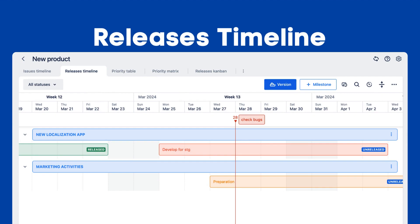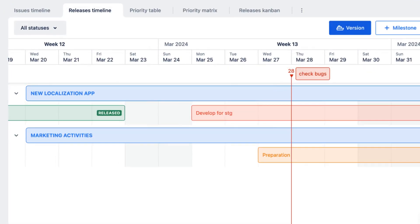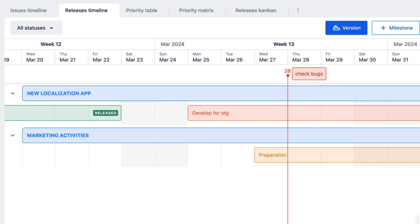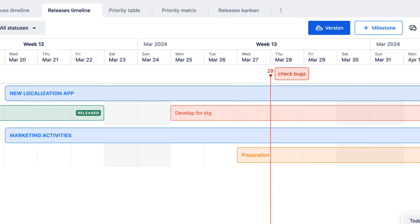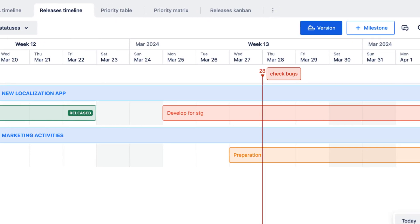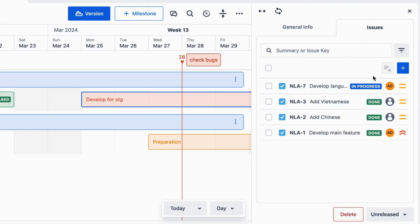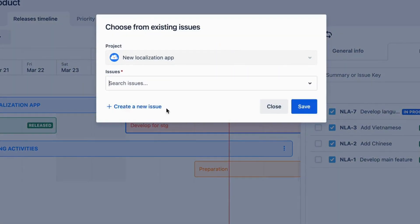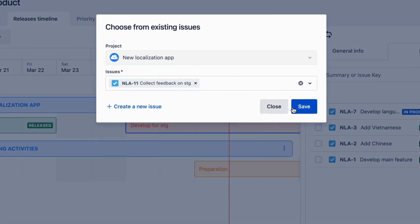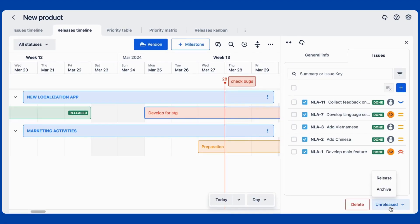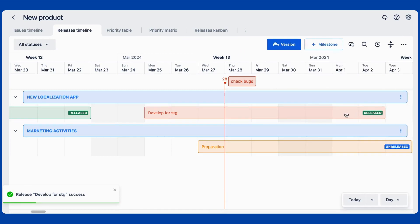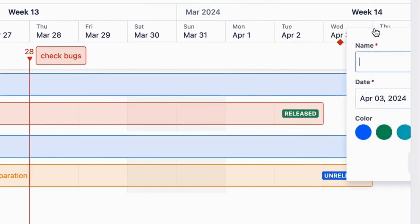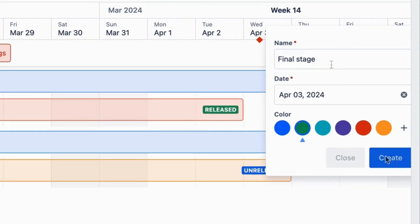As you might have expected, this feature empowers managers to manage version releases of their products in a timeline roadmap. Decide which issues or tasks belong to a version, monitor closely, and set the release to that version when everything is completed. Users can also set milestones on the timeline to mark the important dates in the product development process, all in a portfolio roadmap.